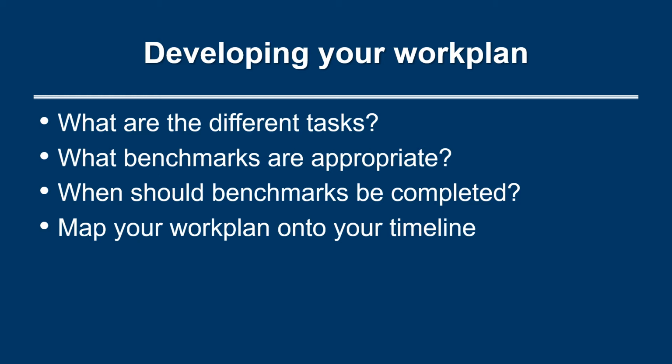Benchmarks will look very different across tasks. Be sure to include estimates for when benchmarks will be completed, as well as who will check that it is done. Your work plan should map onto your timeline so that tasks are in the order that they need to be completed.